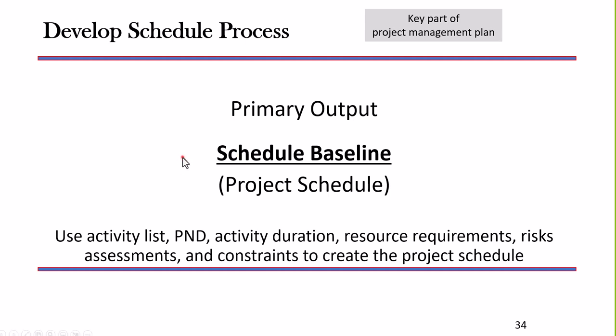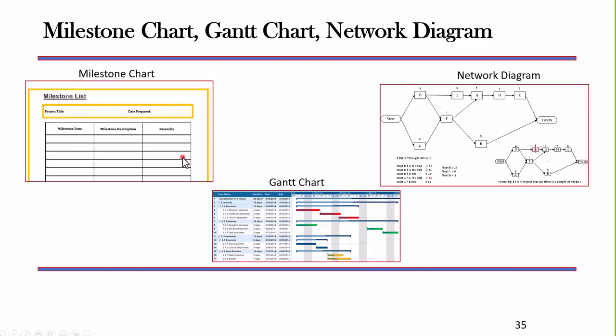In traditional project management, we typically have 3 approaches of schedule. We have the milestone chart, milestones that we have to meet. We need to understand what they are. We create what we call a network diagram, and that's going to show the dependencies of the activities, when they will be completed, their relationship to each other.